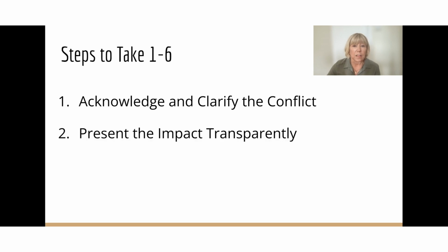The second step is to understand and document the potential impact of the two different options. A visual representation of the two options can help in ensuring the options are well understood. So create a visual like a trade-off matrix or an impact analysis. Show the potential consequences of each path. Fast release might mean higher risk of defects, potential rework. Delayed release might mean a missed market opportunity and loss of revenue.